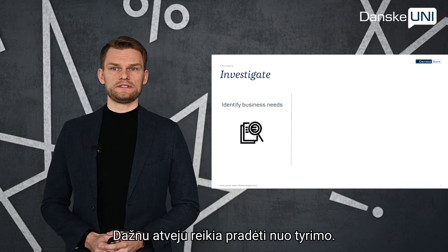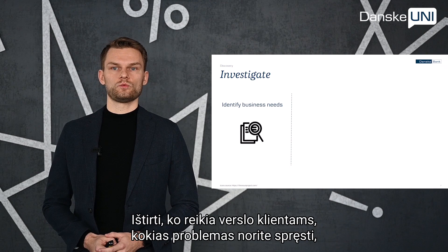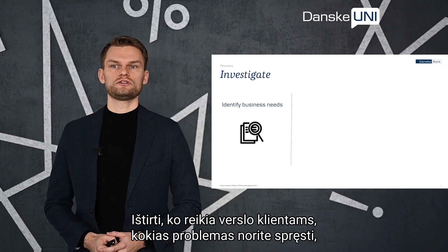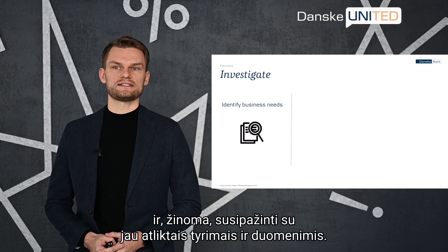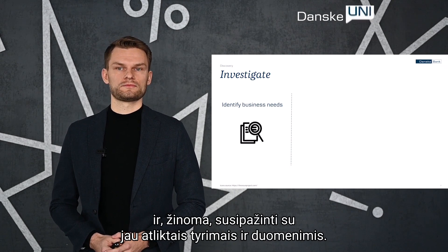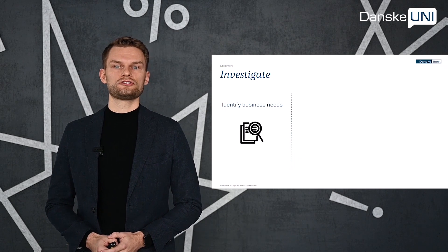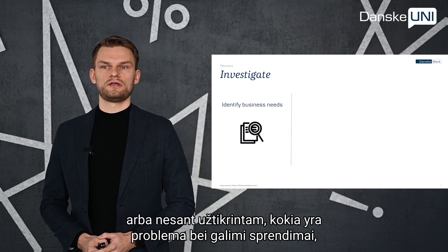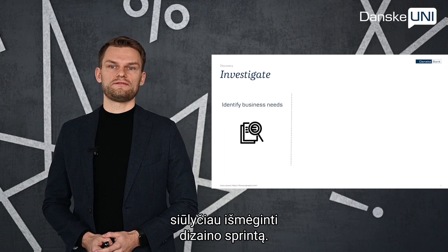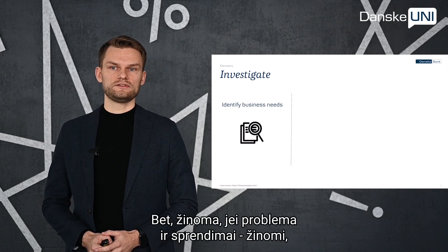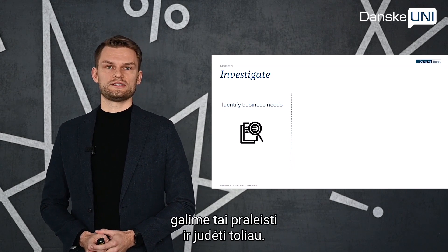Usually the first thing to do is to investigate — to investigate what the business needs are, what problems you want to solve, what could be the potential business goals, and of course to analyze existing research and data. In case the product or initiative is completely new, or you are not sure what the real problem is and what could be a potential solution, I would suggest having a design sprint. But if the problem and solutions are known, then we can skip it and continue with other steps.